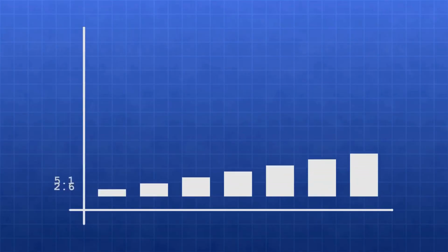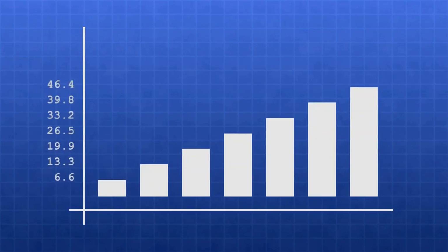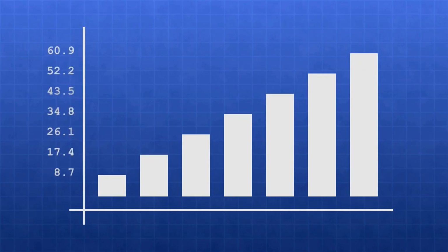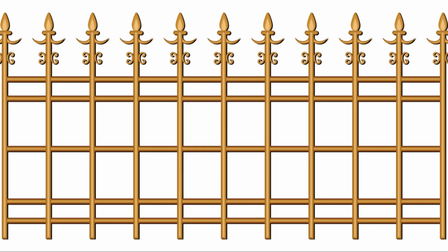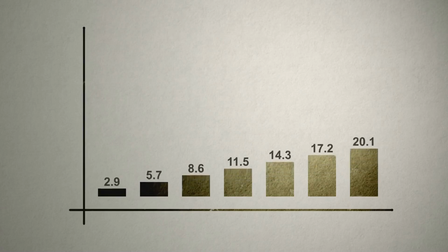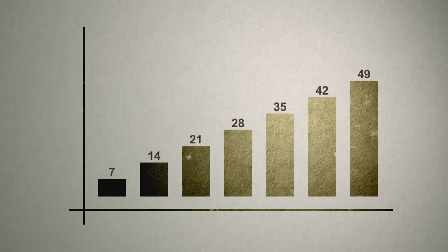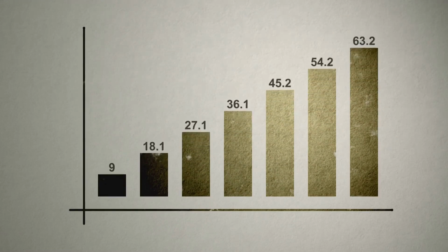Well, there are several tools and techniques used in construction planning, one of which is the fenced bar chart. This is a graphical tool that shows the planned construction sequence on a bar chart schedule. The relationships between activities are represented by arrows, indicating the workflow. However, it's important to note that only key relationships are shown, not all of them.